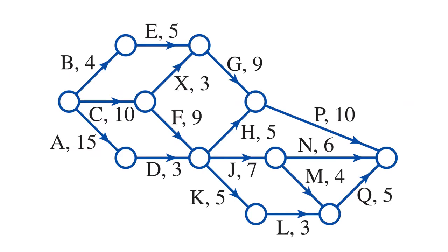So we've got a larger example here, and we're going to forward scan first of all, to work out the critical path and the early completion time. So let's do that. We start off with 0. Now 0 and 4 make 4. Now 4 and 5 make 9, but this is also 2 out, so I'm going to have to look at that one in a minute.